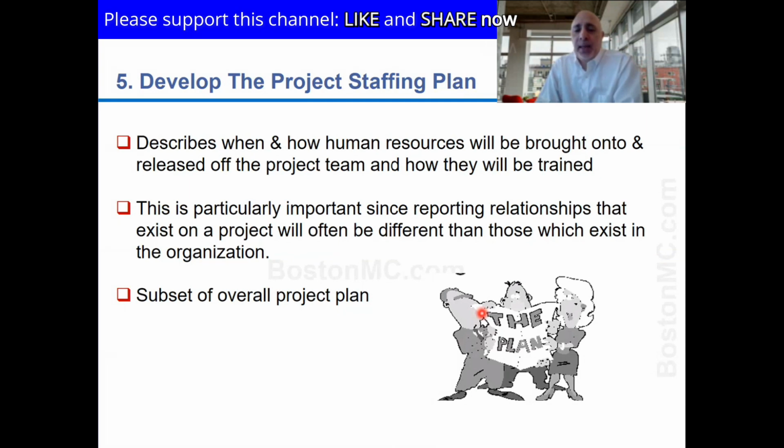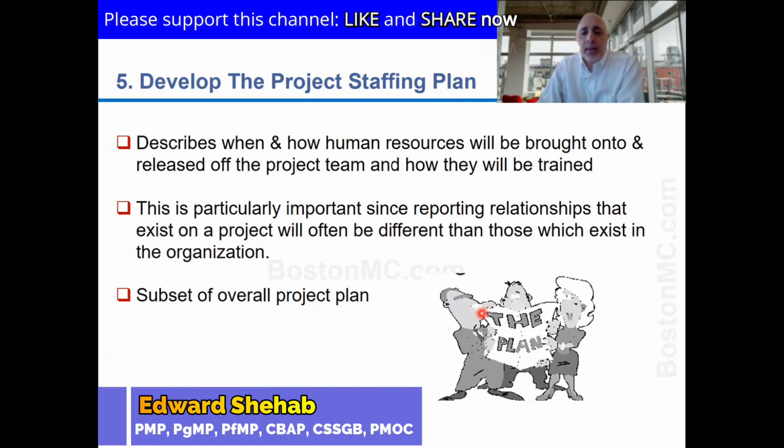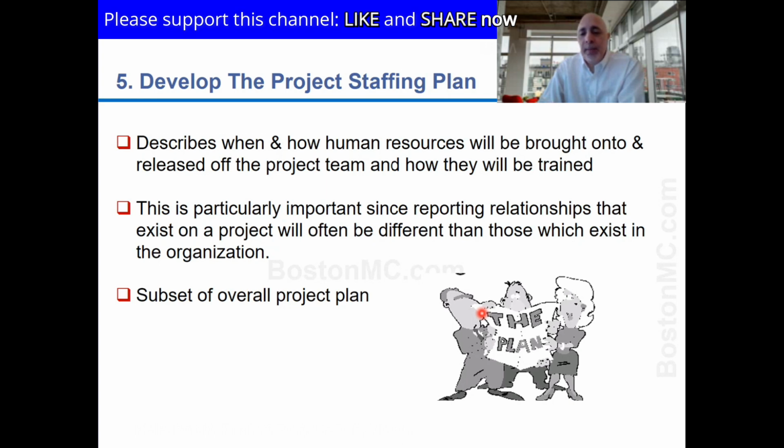Let's see what else we can plan, because right now we did the initiation with the charter, the stakeholders, and then we went into planning. We started with requirements, we did scope, then the WBS, then the schedule. And some would think that maybe you should calculate your budget, but really before you do your budget, you need to ask yourself about the resources, because the resources will have an impact.